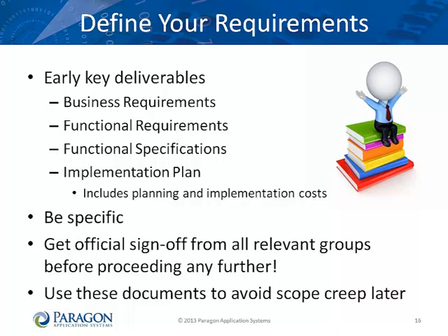Even if your teams don't believe in much documentation, do not skip these steps. With so many people involved in this project, it is very helpful to have some documentation to fall back on. There are very likely to be misunderstandings along the way about exactly what is supposed to be delivered. If you have a requirements document that all groups have signed off on, it is hard for someone to dispute that later. Be specific about what you are delivering. Clearly defining project deliverables will help you reduce scope creep.